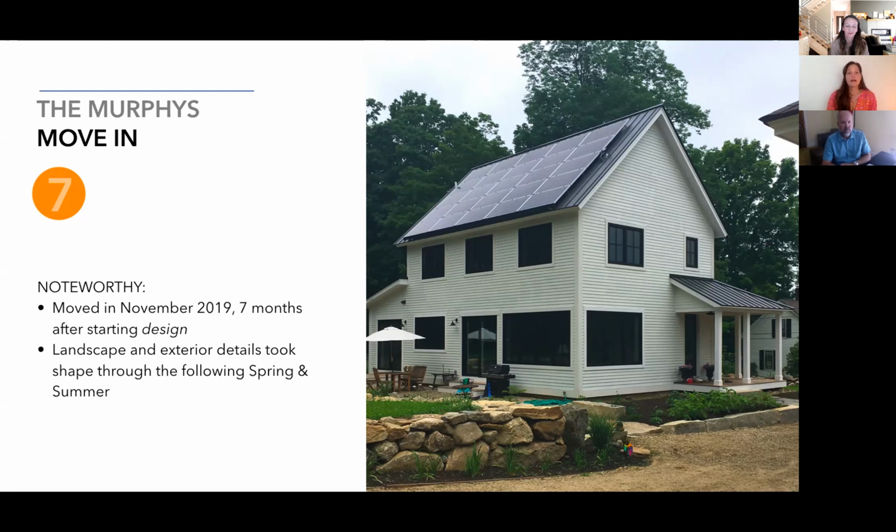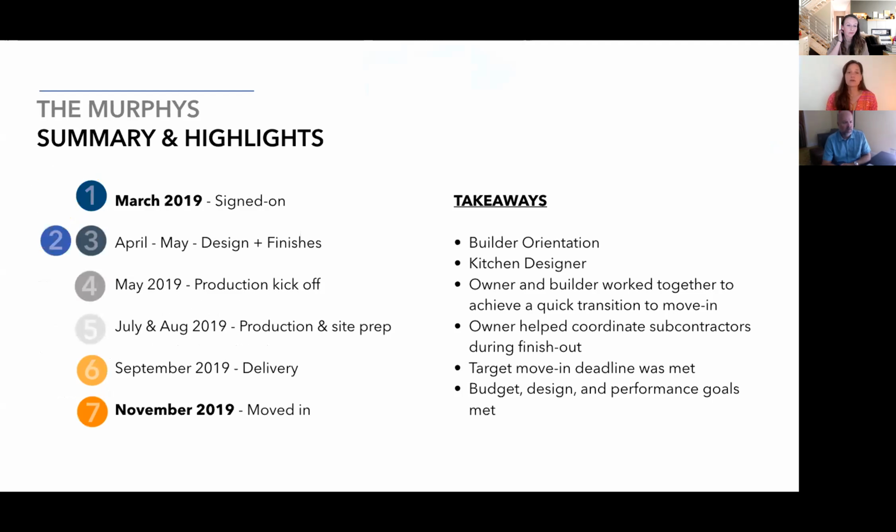So to recap, they signed with us in March of 2019. We moved through design quickly and finished selections quickly in April and May. We had our production kickoff meeting in May of 2019, late May. And then in July and August, that's when production was going full steam ahead and the site prep was underway. September 2019, we saw delivery of the modules. November of 2019, they moved in.